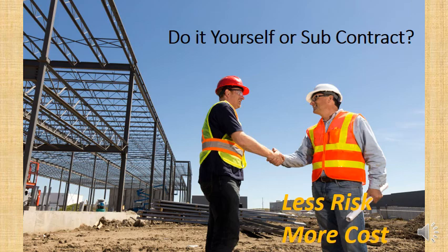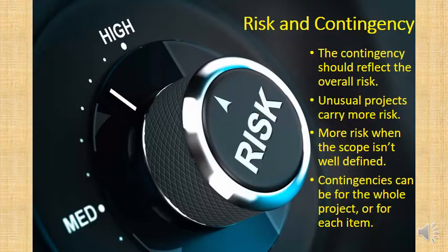It will cost you more than if you did it yourself. So that's something to consider. And if you subcontract the entire project, well, in fact, there's no benefit. You're not actually adding any value to the project whatsoever, and it's better for the sponsor just to hire the subcontractor or the alliance of subcontractors together and cut you out as the middleman.